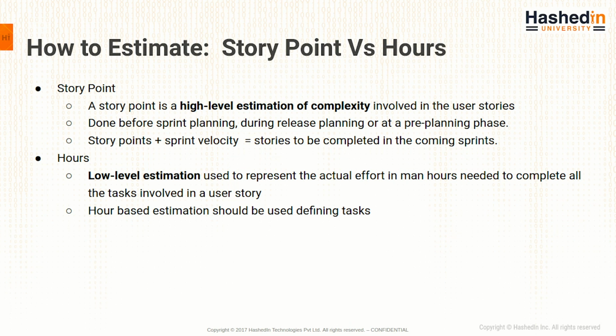Now the next is hours. Hours is more like a low level estimation which is used to represent the actual effort in man hours needed to complete all the tasks involved. And this is done when you are defining the tasks. What happens is that you create the high level stories, you estimate them based on the complexity using story points, and then you divide them into tasks, and those tasks you assign to your development team members and they estimate them on an hourly basis.